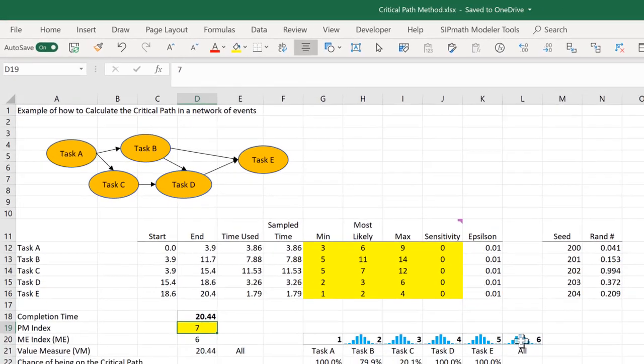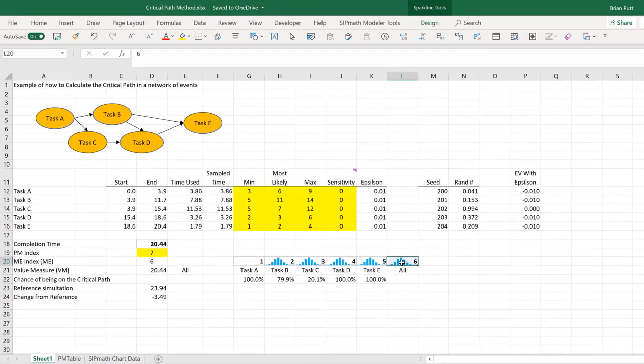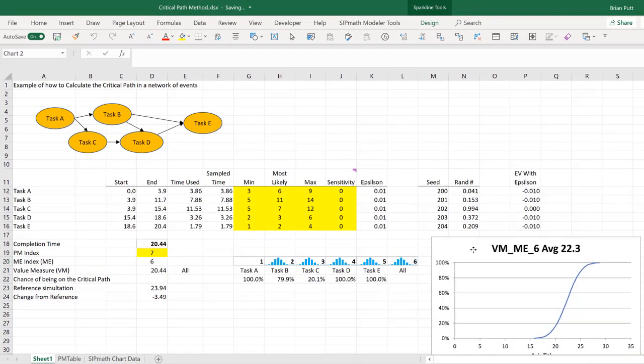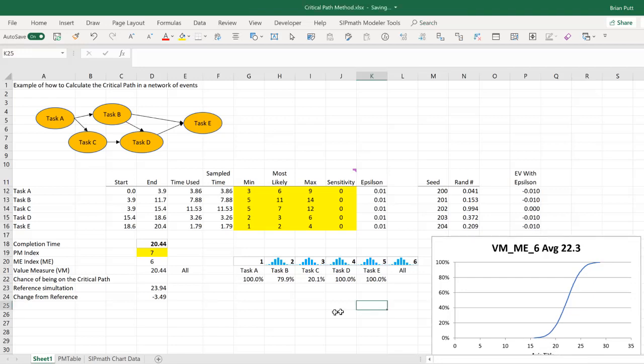While we're here, why don't we look at the S curve of this distribution. So we can see that the average is 22.3 with a range about 16 to almost 30.